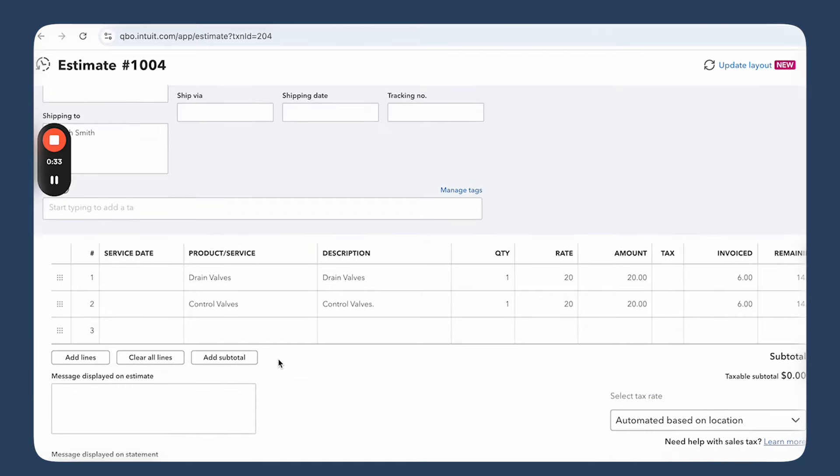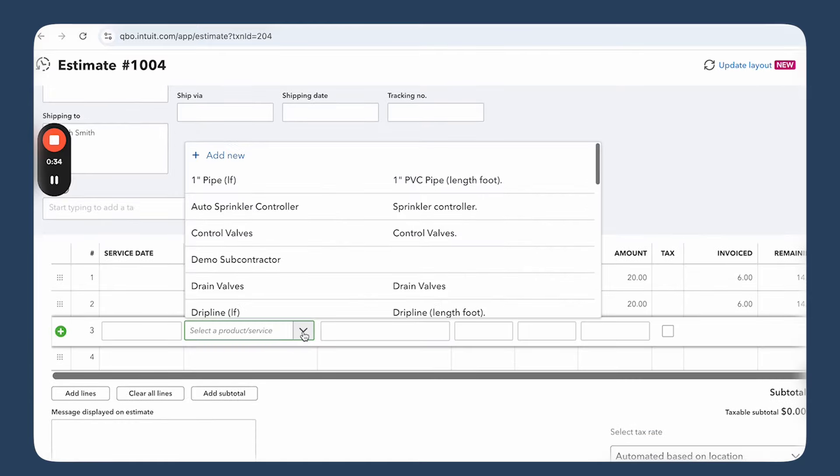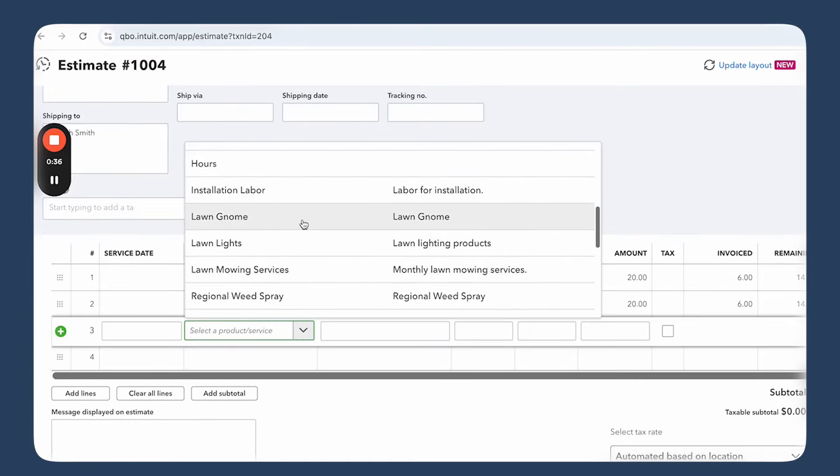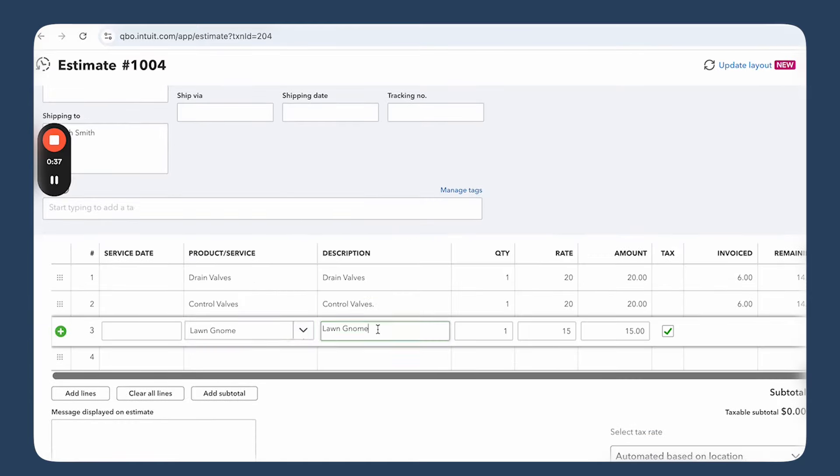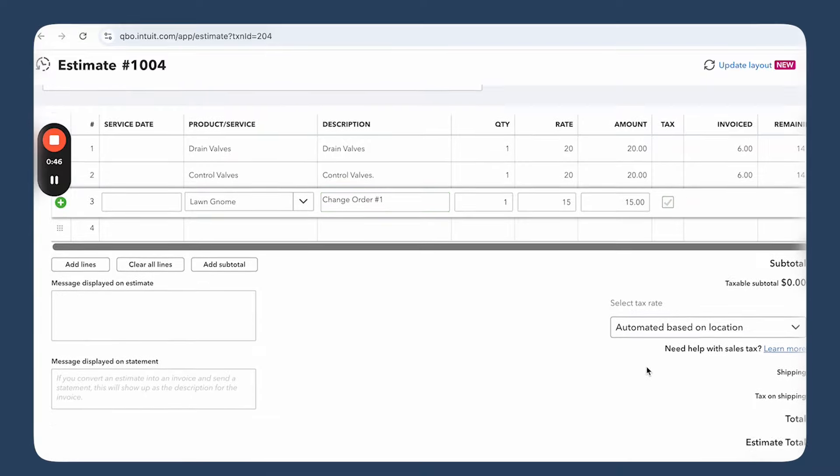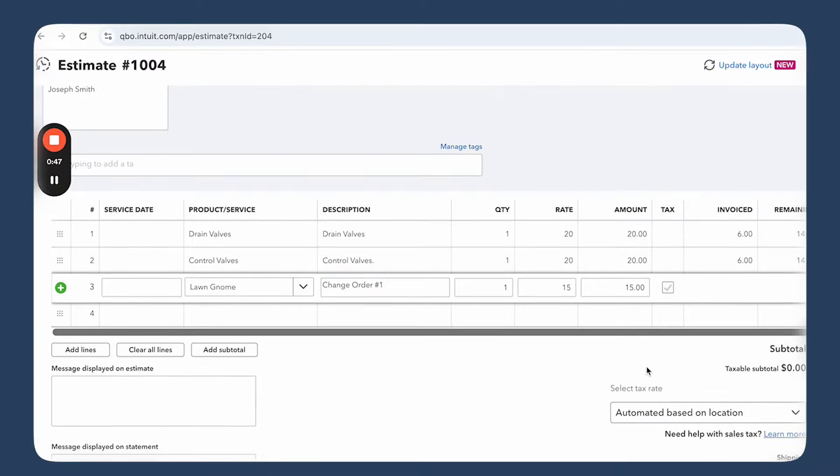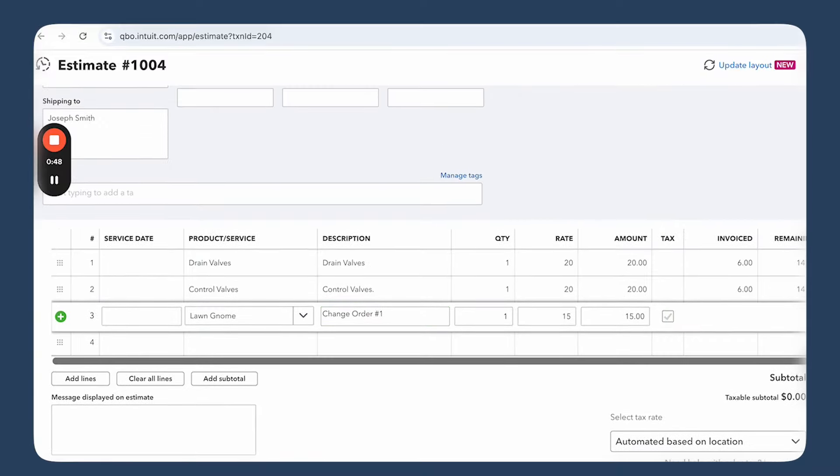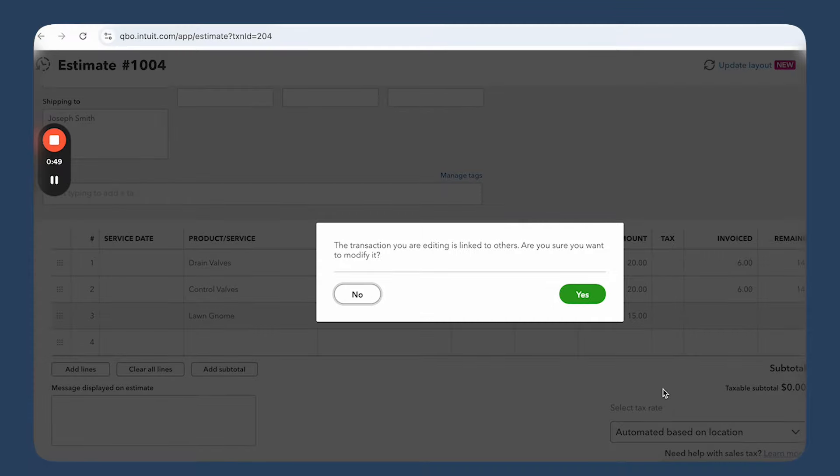Second way is to find your original estimate for the project, add the missing lines for the change order, mentioning in the description that this is a change order, and send it to clients for approval. So this way you wouldn't have to keep track of two separate estimates and everything will be in one place.